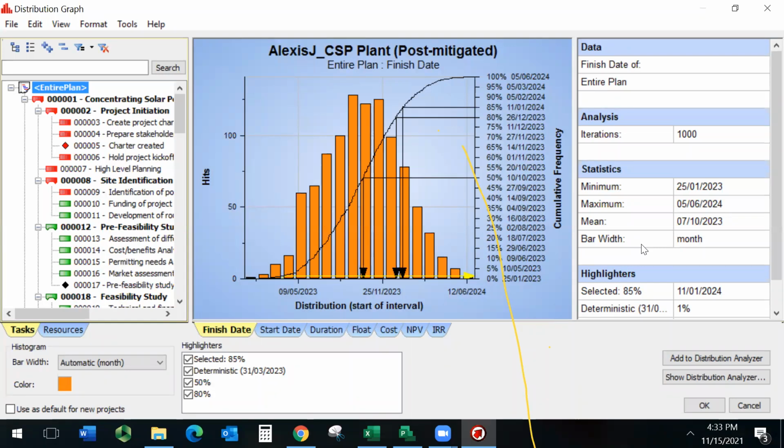So what does that mean exactly? It means that until I have a list of risks identified for my project, entered into the software, and linked to my WBS items with pre-mitigations and post-mitigations impact, I don't really know with some level of accuracy, or confidence, which is a better word, that my risk analysis is actually working.